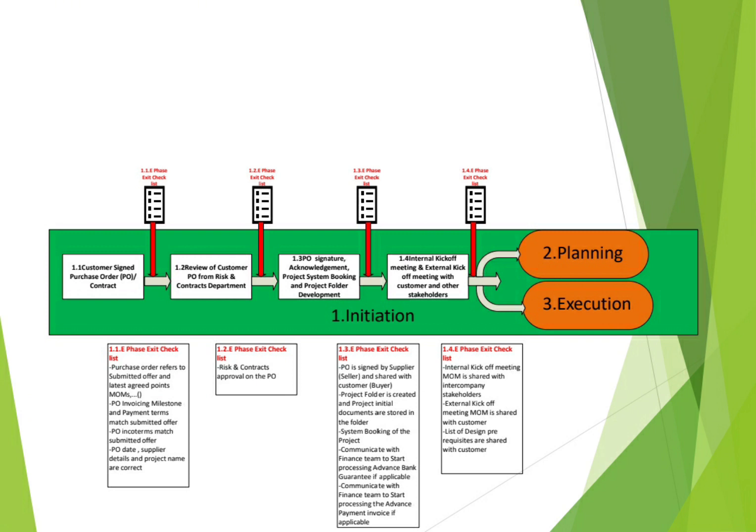So during the external kickoff meeting, or the project kickoff meeting with your customer, you will let your customer start to explain about this project, the importance of this project, the key milestones of this project, his expectations about this project. Also, if you have the prerequisites list available with you, you can show it to the customer and start discussing it, the prerequisites to start the design phase of this project.